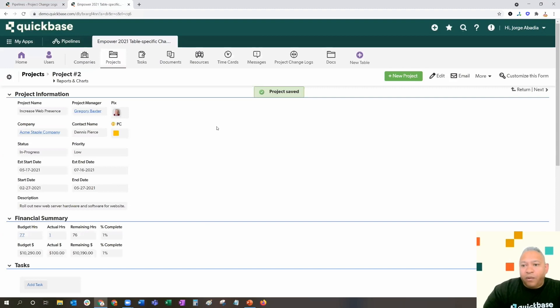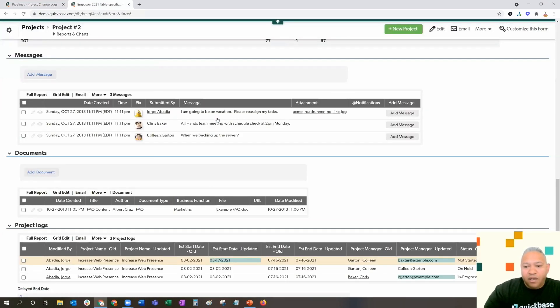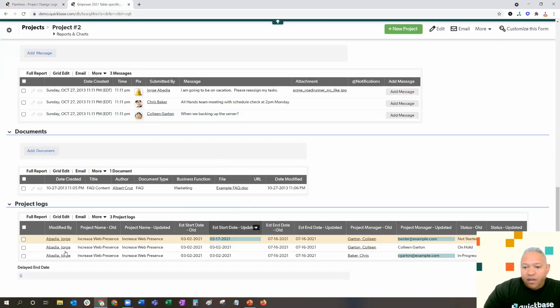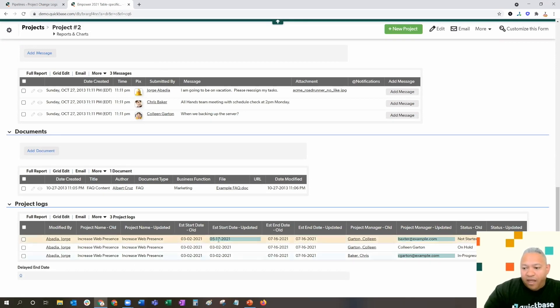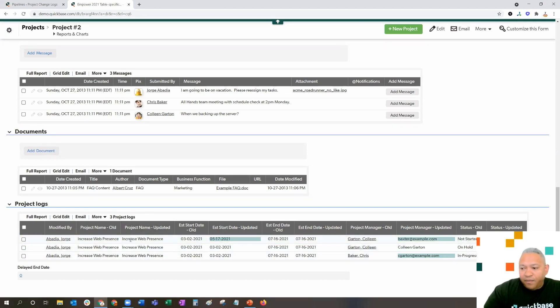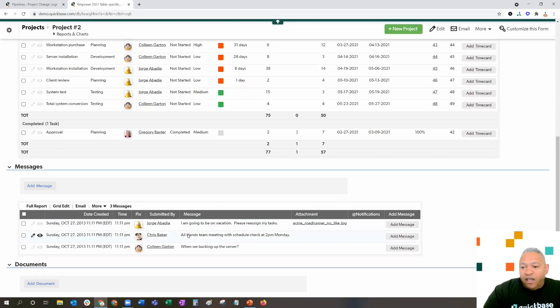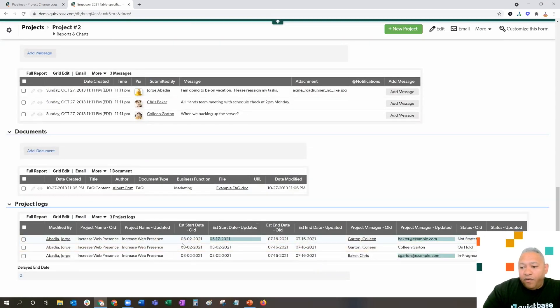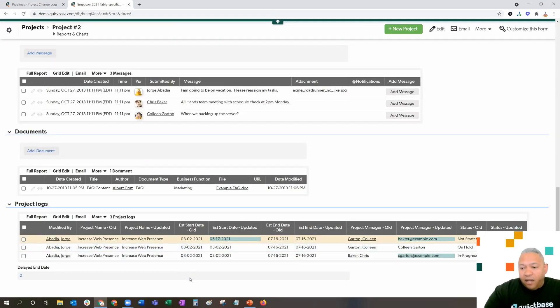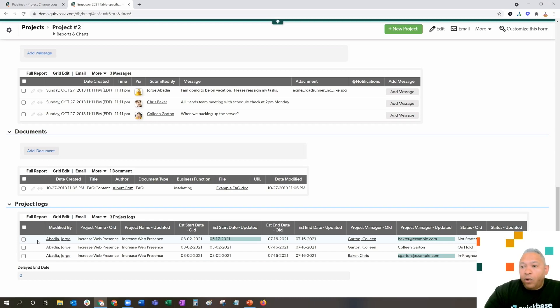Let's go back and see what happened inside of the record. Now we're in a record. We've updated the record. If you scroll down to the project logs heading, we'll notice that we have a new project log record. We'll notice that the estimated start date is highlighted as are the project manager updated and the status updated to let you know that I made these changes. As you can see, over time you can form a pattern to get a really good idea of who's making changes when and if a start date or an end date gets pushed back, that immediately gets flagged as a possible concern for us to manage either internally as a team or with the customer.